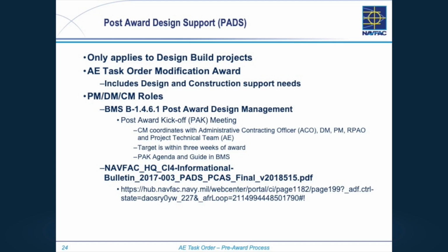We are the lead on that, and we pretty much have the project hostage until we get design approval. They can't put a shovel in the ground unless there's an early start package. Until we say the design is good, start construction, they're not doing anything. And so it is a time-consuming role.